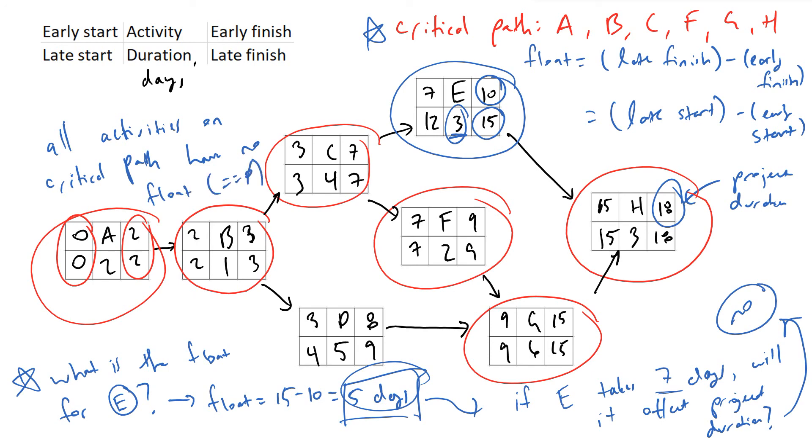So basically if any of these activities—A, B, C, F, G, or H—take longer than we anticipated, if A takes three days instead of two days, we're going to be adding a day to our project's deadline. That's the reason why we care so much about things that are on our critical path, because they're basically the bottleneck in our project.